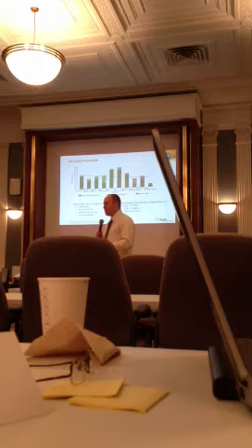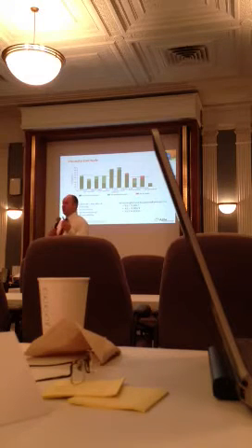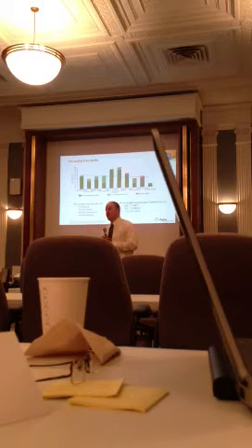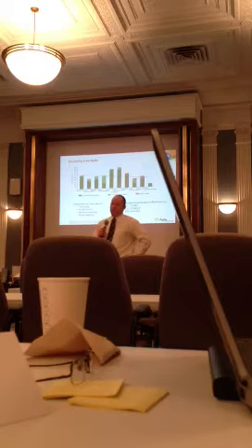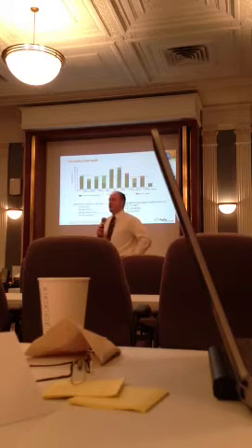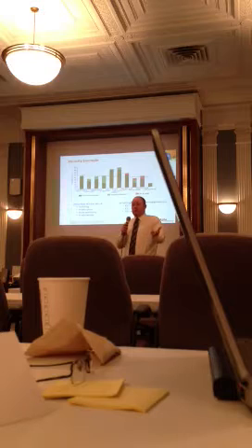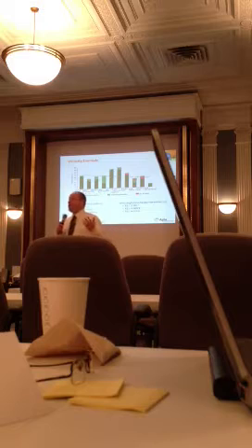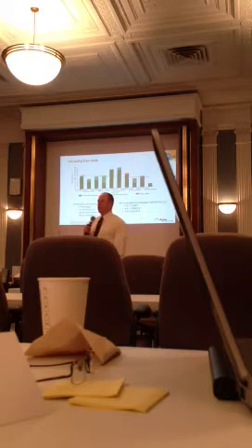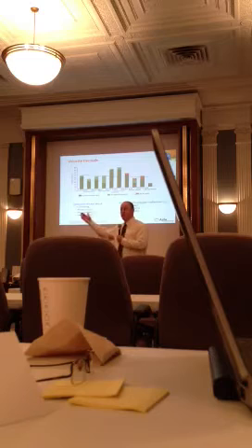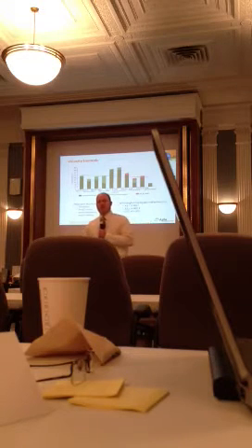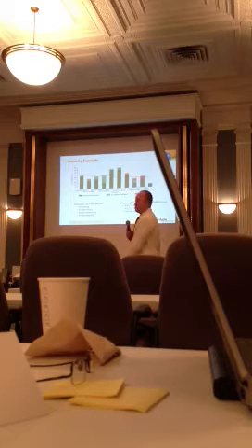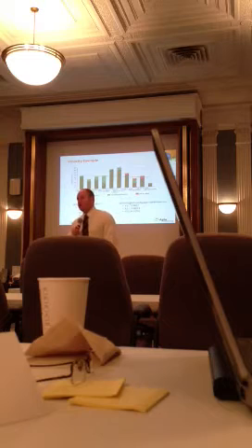They probably had already been developed. They maybe had been already mostly tested. There was only a little work left to do. Otherwise, as a Scrum Master, I would look there and go, well, we got 20 story points carrying over from last iteration. We can do about 105 if we're operating in full force. I would only let my team commit to 85, right? The fact that I let them commit to 100, to me, means those were mostly done. So that's the real-life information you need to know in order to be effective in how much you should be able to commit to for an iteration. So I let them commit to 100, and they didn't deliver 100, so I was wrong. I let them commit to too much.